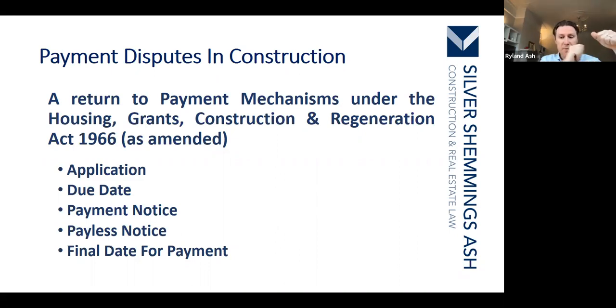If there are no provisions for applications for payment in a construction contract, then if a party applies for money, they can't rely upon that application as being a default notice, which will entitle them to payment. Basically, they have to sit back and wait for a certificate or payment notice to be issued because the application wouldn't be recognised under the contract or at law.